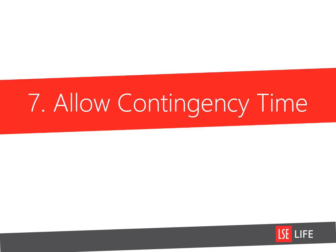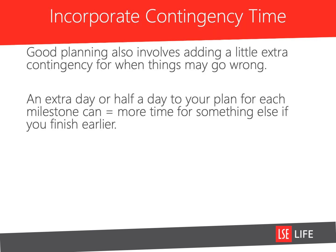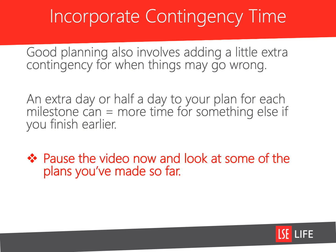Step seven: allow a little contingency time. Good planning also involves adding a little extra contingency for when things may go wrong. An extra day or half a day to your plan for each milestone can equal more time for something else if you finish earlier. Pause the video again and look at some of the plans you've made so far. As you continue to fill in the planner, allow a little extra time than you think activities will take. Then, if you don't use that time, you've got an added bonus of some spare time to work on something else.